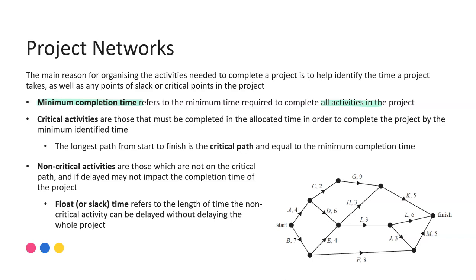The critical activities are those that must be completed in the allocated time in order to complete the project by that minimum completion time. That means there cannot be any delays - if the time taken to complete a critical activity is longer than the duration stated on the network or in the precedence table, then the overall completion time would also be delayed. The longest path from start to finish is what we call the critical path, and that is equal to that minimum completion time.